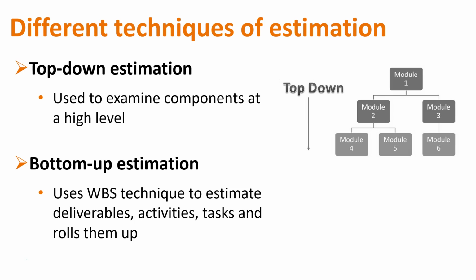Now what you're doing is a combination; it's still bottom up, but you're also time boxing, and we'll get into that in a minute. I think time boxing is in here. That's where you say, we need to deliver sprints anywhere from 2 to 4 weeks. Our minimum is 2 weeks, because otherwise it's kind of pointless and a lot of extra effort for delivering value, unless it's a critical element that we need to push. Or 4 weeks. We really don't want to wait more than 4 weeks for any sprint. That's typically what I see in Agile. It's anywhere from 2 to 4 weeks. It depends on the team.